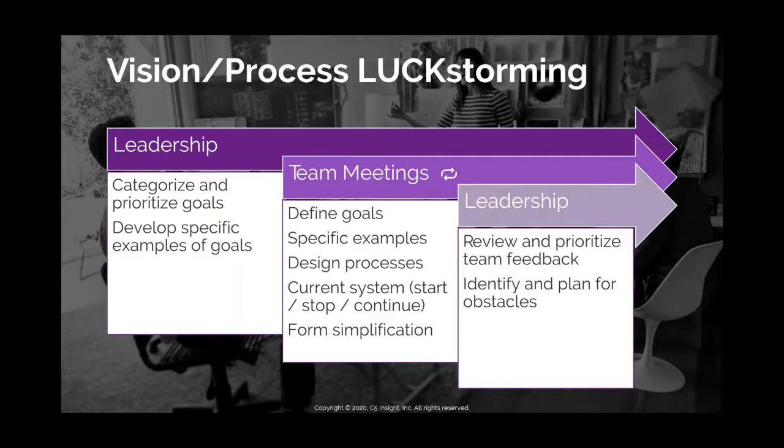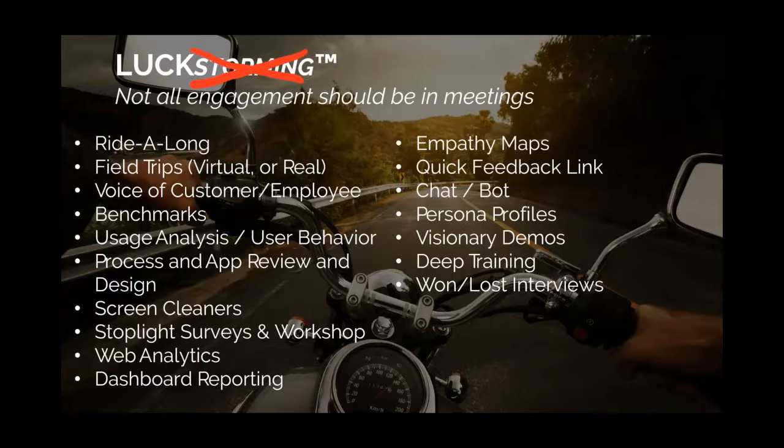So you repeat the process with other teams, then come back to the leadership team in the end and say, we've gathered this information from these 3 or 5 or 8 or 15 different teams. Here's what their priorities are. Now, leadership team, we need you to look at all of their priorities and help us set a master list of priorities that includes yours that we started with, but also includes all of the teams. And that's where you start to get a lot of innovative ideas.